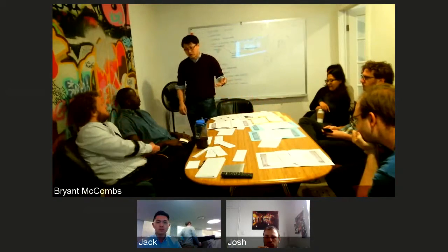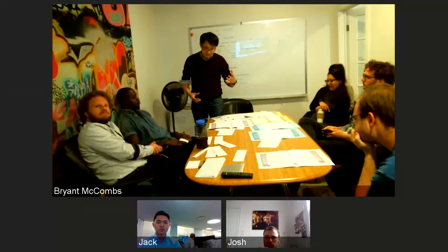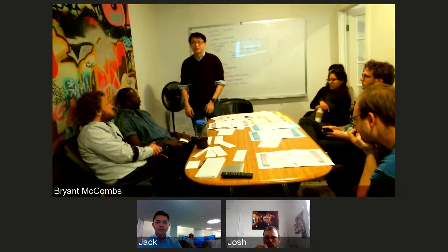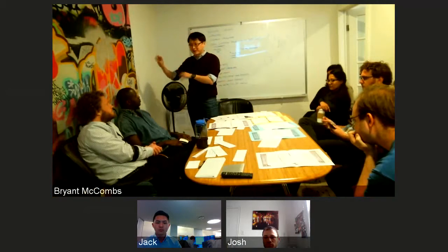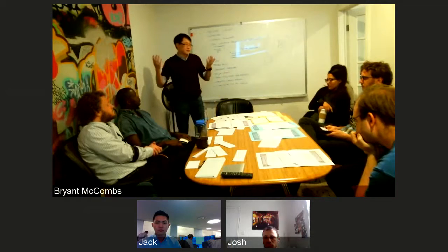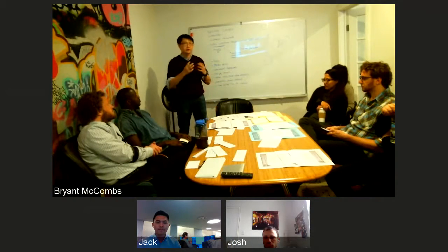Maybe it's an 8-hour estimate after those two are played, and it's worth your investment in those two. If you ask them and say, hey, these two seem linked, and they say, oh, yeah, they are linked logically, but they're not linked in the code, this is going to be 64 total hours of work. It's just that way. Once again, it's a tool to facilitate communication.